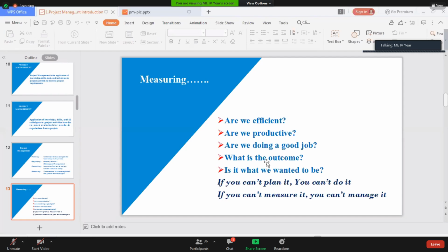If a project is of 100 crore rupees and the chief minister is monitoring it, for example Kaleshwaram, about a 90,000 crore rupees project, the chief minister will not ask how many tons of concrete or steel is done. He will see how much is paid out of 90,000 crores. They say, sir, 45,000 crores of work done, 60,000 crores of work done. Based on that, he will calculate the percentage of work. That's called defining the measurements.